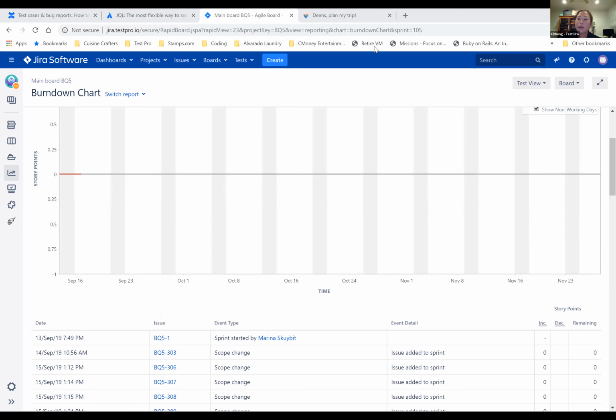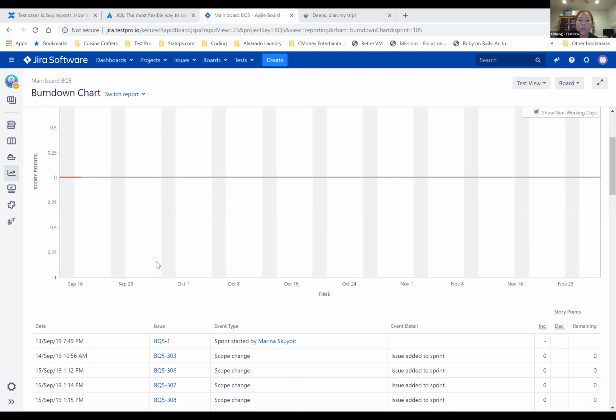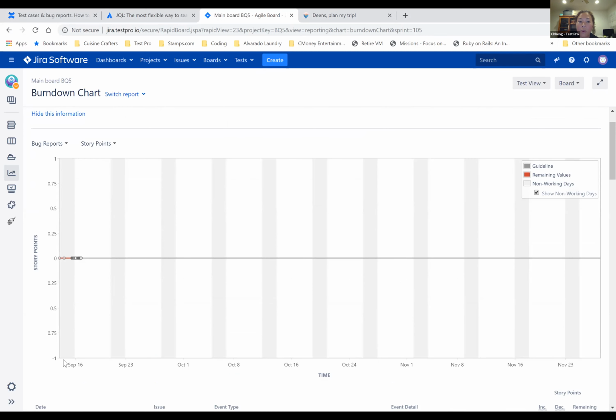So when you are at work, real work, this is what the company monitors. We don't have any guidelines yet. We haven't added points. We haven't estimated which stories are going to which sprint, but there's a basis. There's a basis in the sense that this is the baseline. So we start from 0 points to how much we need to burn down. So let's just say we need to burn down 200 points this sprint cycle, which is 2 weeks, 80 hours for those 2 weeks. This is our burn down chart.